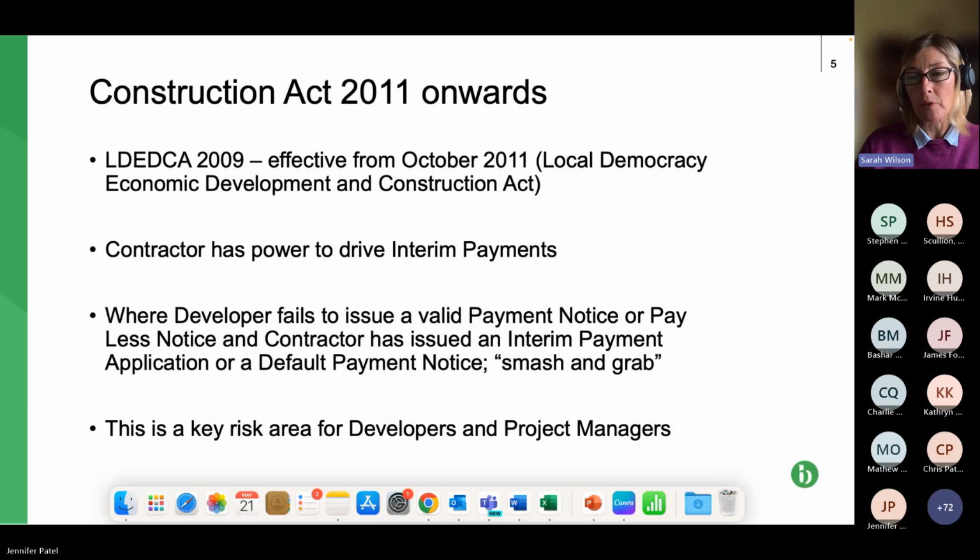It's slightly more than that, but of course you can see it's not the merits adjudication that we looked at a few minutes earlier. So that's the adjudication that you start. You can see it'll be a lot more simple and speedy than a merits adjudication, and the courts coined the term smash and grab to describe what this type of adjudication was.